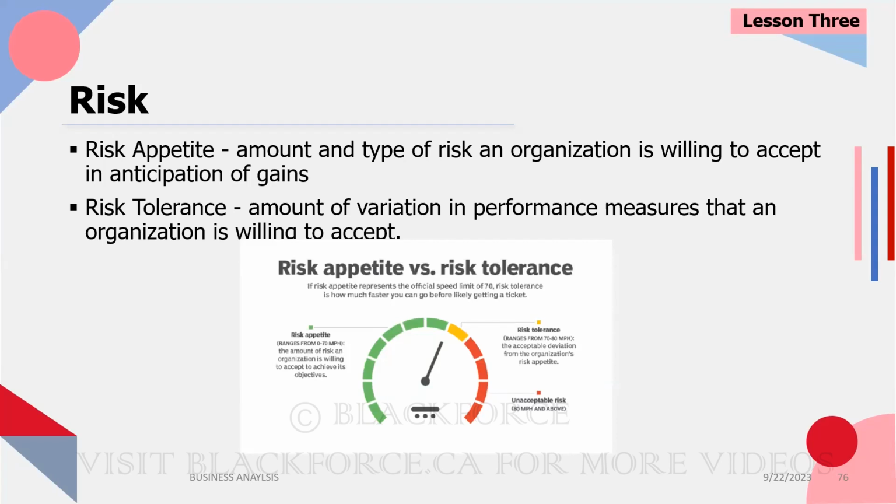If the errors get up to 20% of the total stories, so we've developed a total of 100 user stories and 20 of them have bugs, we have hit the limit of our risk tolerance. If we now go to 21%, meaning 21 of the 100, we have exceeded our risk tolerance. We need to act immediately.